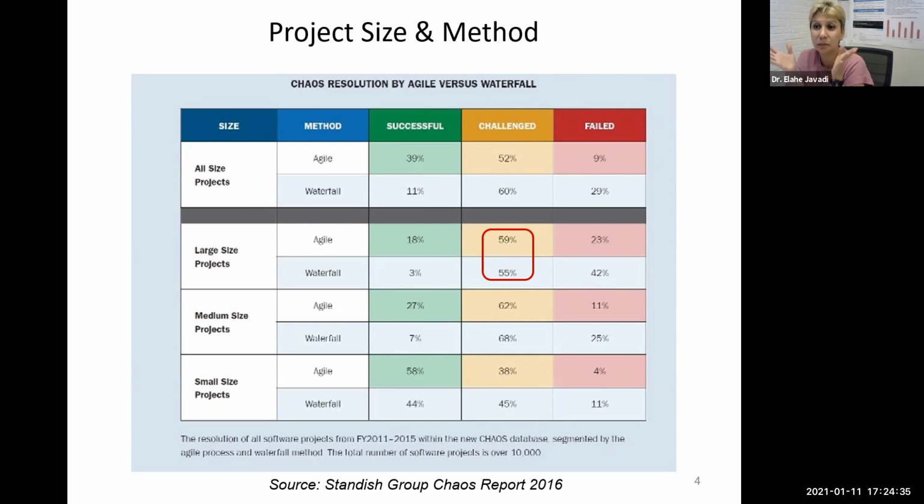If you have a team and they are all used to waterfall, the gain is not that much to justify retraining and transitioning to a new approach. For larger and medium-sized projects, the gain justifies the work you put into retraining your team. So good observation by Jonathan and Eric.